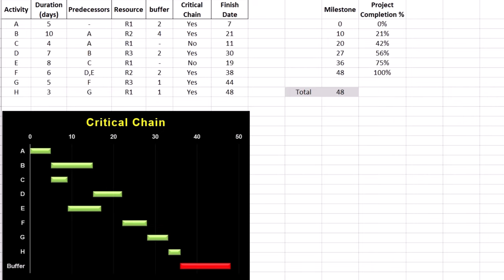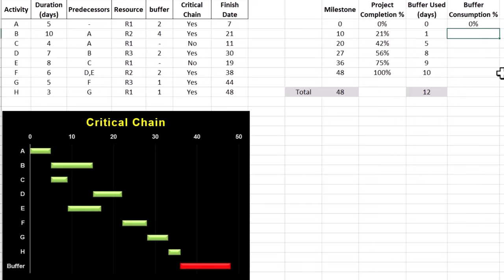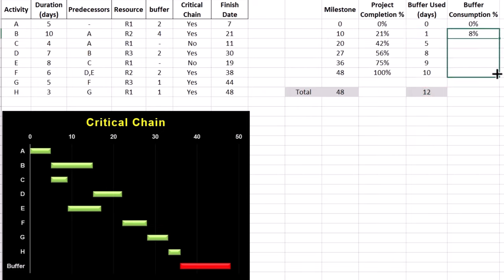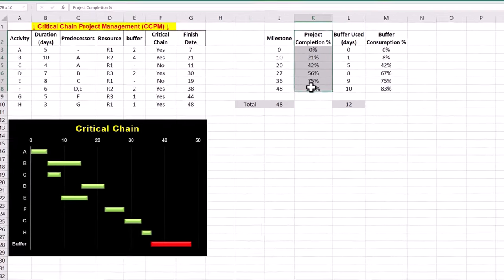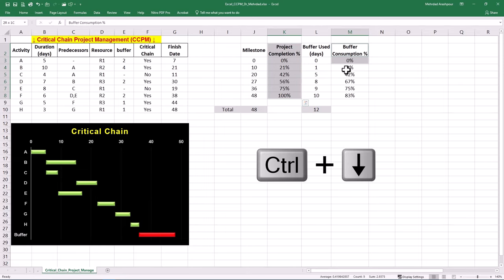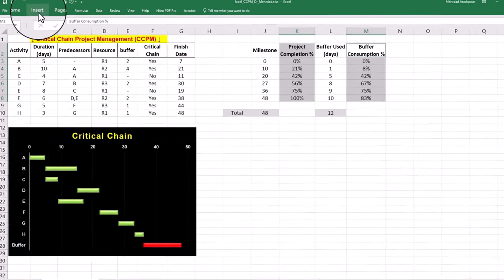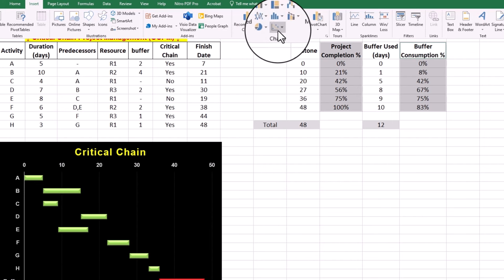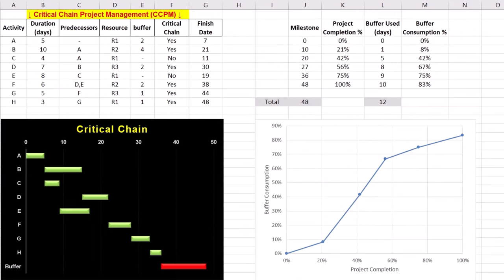We should monitor project activities at each milestone and record buffer consumption based on the site data. For example, at the 10-day milestone, 1 day of buffers out of 12 days has been consumed, which is 8%. We can find buffer consumption for other milestones using the site reports. For plotting the fever chart, select completion percentage and buffer consumption columns. Insert scatter plot with straight lines and markers. Feel free to adjust the style to suit your project reports.